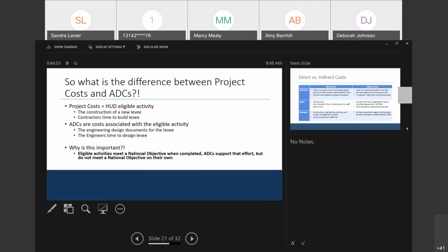With the contract, of course, the entity knows that it needs to undertake the service, or if they're going to competitively procure for a contract, that contract is building in overhead and profit. A contractor is probably going to build in consideration of what's necessary to deliver the grant, but they do have to show that the hours they worked can be attributed to delivering the activities. If they're going to do the reporting, hours shown for reporting are not going to be an eligible activity delivery cost. It just goes to what they're saying they're going to provide to the grantee. They may be providing that service on top of the implementation delivery. The quarterly reporting is what I'm referring to as the piece that is truly administrative.